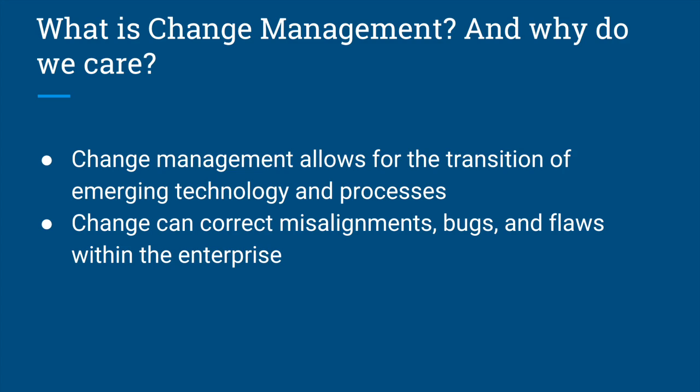With each iteration of technology, there is a chance that it may be misaligned with the infrastructure as a whole, meaning it may have flaws or bugs that need worked out prior to the launch. For this reason, many companies decide to run their new technologies in parallel with each other. This is something we have learned in Ernie's project management class.